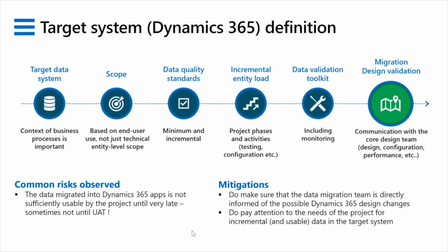So make sure that does not become a risk for your project. Take specific means to make sure that you are taking data into the target system that is usable right from the very start, right? Now, of course, its usability may be limited in the first iteration, but you need to get it to be fully usable much earlier than user acceptance testing.